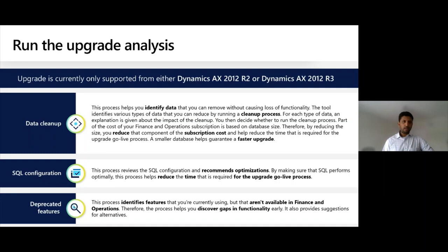faster. The upgrade analyzer also gives you a list of deprecated features in your AX 2012 environment. With this list, you can also identify the gaps that you need to address when you move on to the D365 implementation. So running the upgrade analyzer has to be the starting point for your data upgrade process.